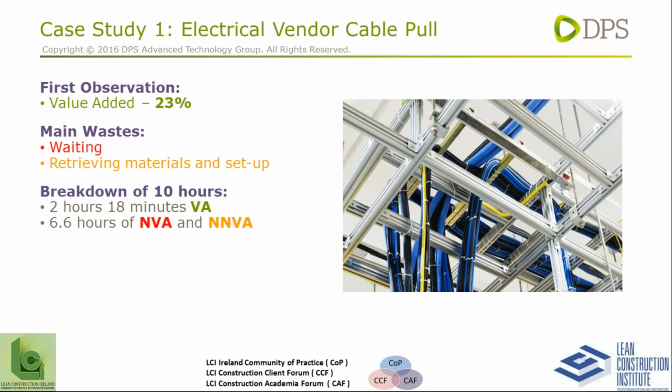So let's look at a breakdown of the 10 hours that we observed. 2 hours and 18 minutes was value added, that's 23%, and about 6.6 hours were non-value added and necessary non-value added. They're the waste, the opportunity.